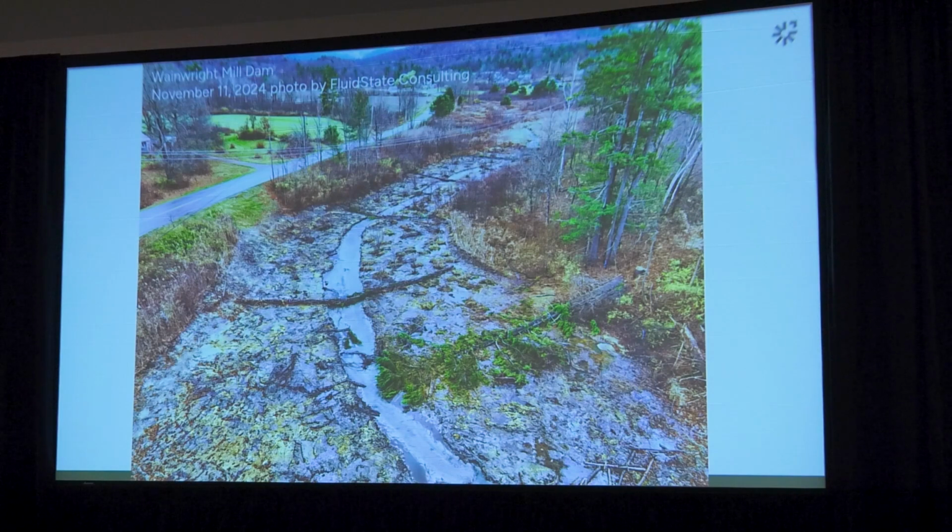Those are all habitat elements that were done by a separate contractor, one that specializes in wood, the Nature Conservancy, and it definitely required some extra coordination because the idea was to get some of those wood structures in as the contractor progressed up through the project so that it was phased. So those were done along the way.